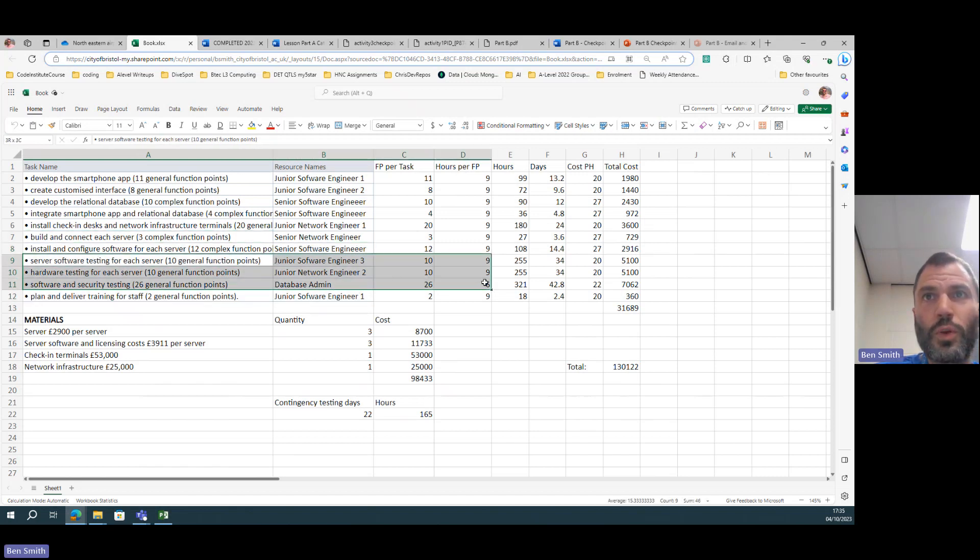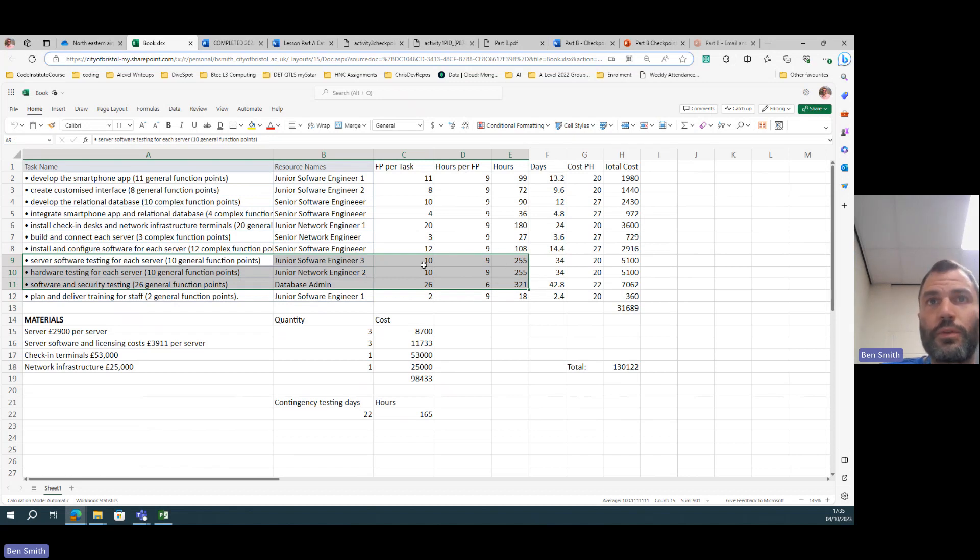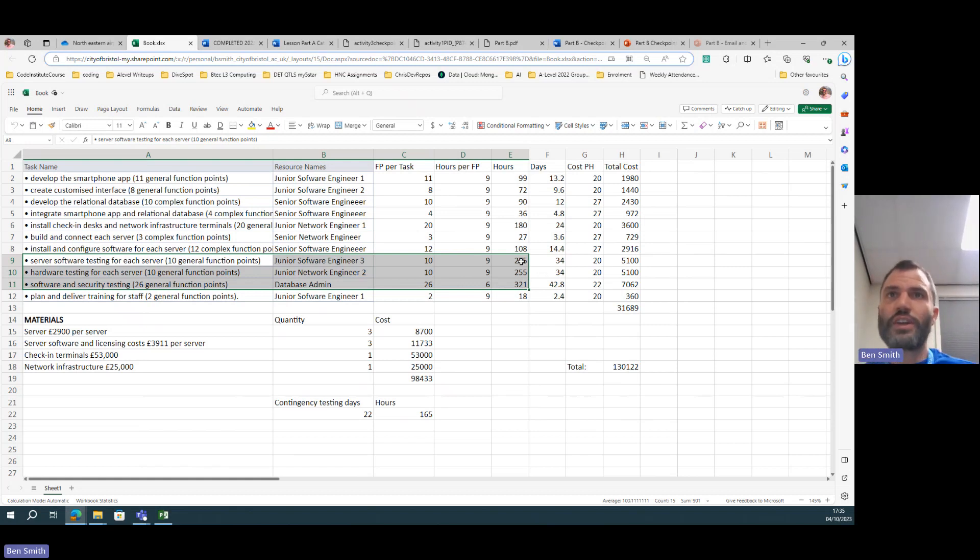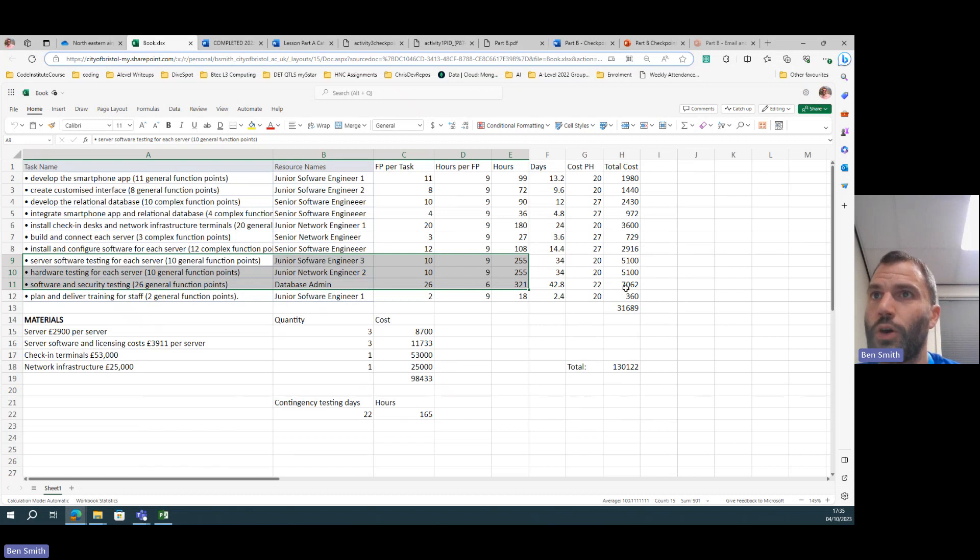You add on the extra hours, and update the days as well essentially. So you can see here I have actually added on the extra hours and so that's changed my costings.